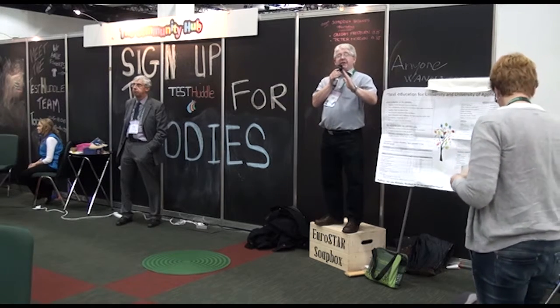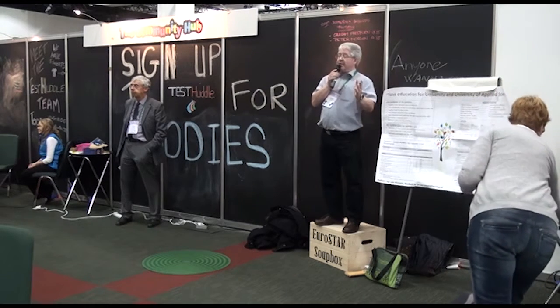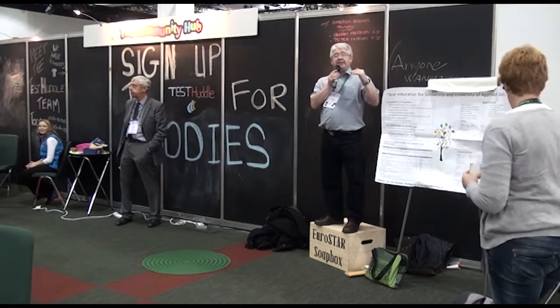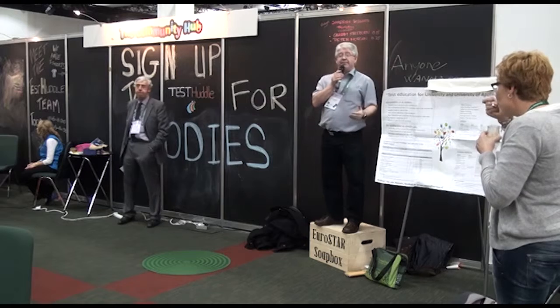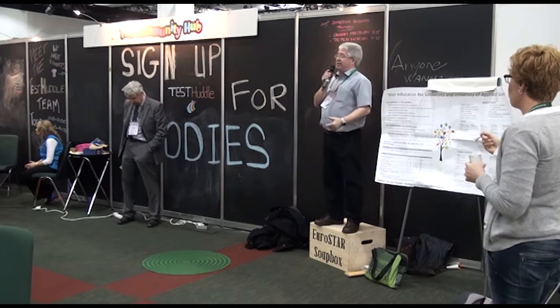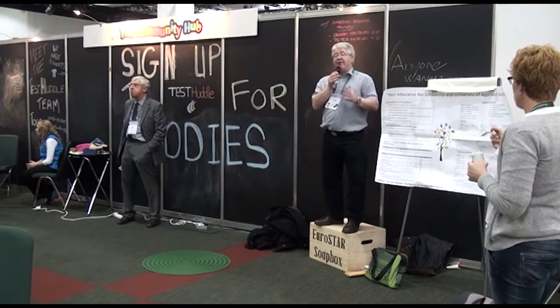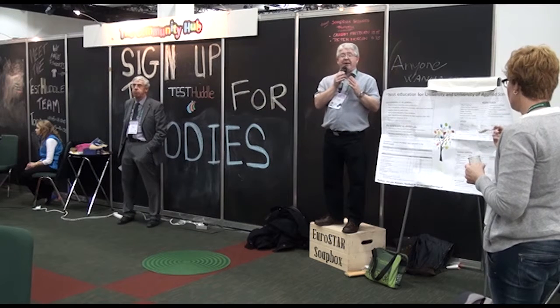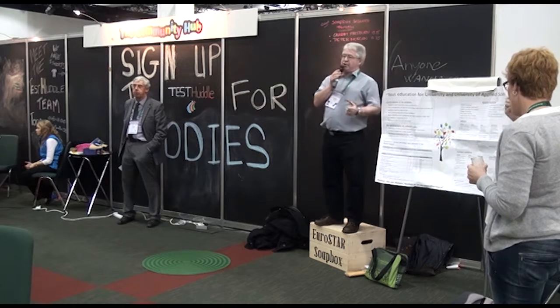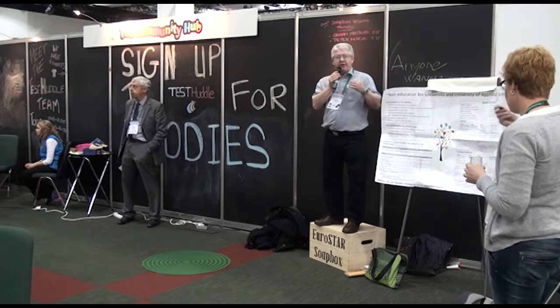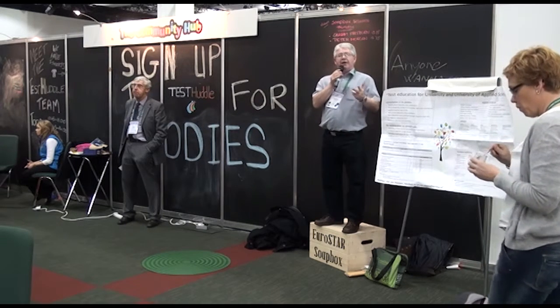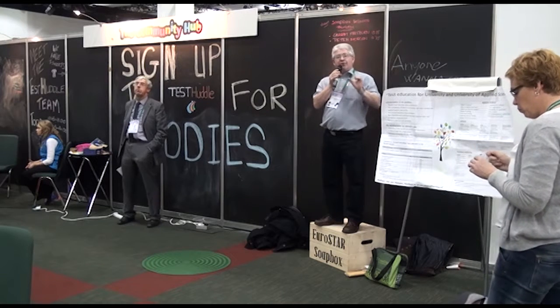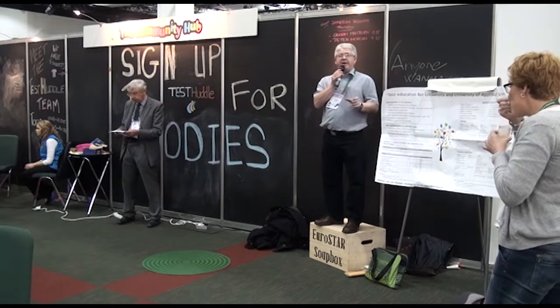If either of the sides for time and cost get bigger or smaller, we can see it. Because if you put little marks on the side of that triangle, you'd see more of them or less of them. But the quality side of the triangle can get squeezed very easily, and you don't see that happening. And when you've got project managers who are only being tracked in terms of their performance on the basis of time and cost, what you're going to get is a lot of squeezing on that quality side of the triangle.